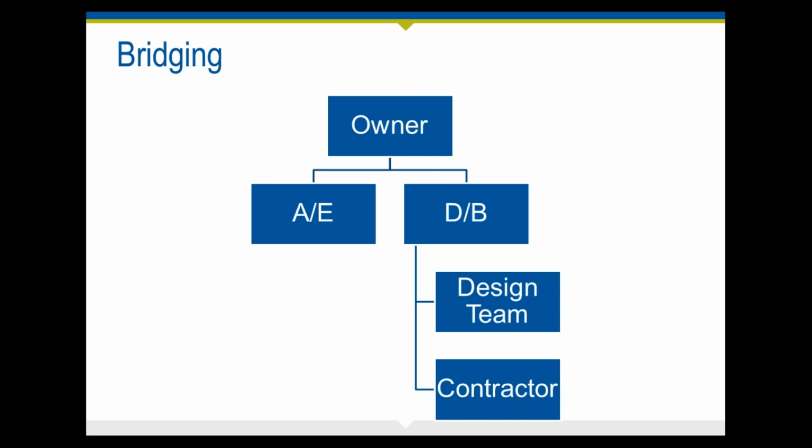So they may engage an AE to assist in the development of a program, prepare performance requirements or design criteria, assist in the selection of a design builder, and review the construction documents that are prepared by the AE who is part of the design build team, so that the owner really has the benefit of somebody who can act solely, who has loyalty solely to the owner and is not part of the design build team.